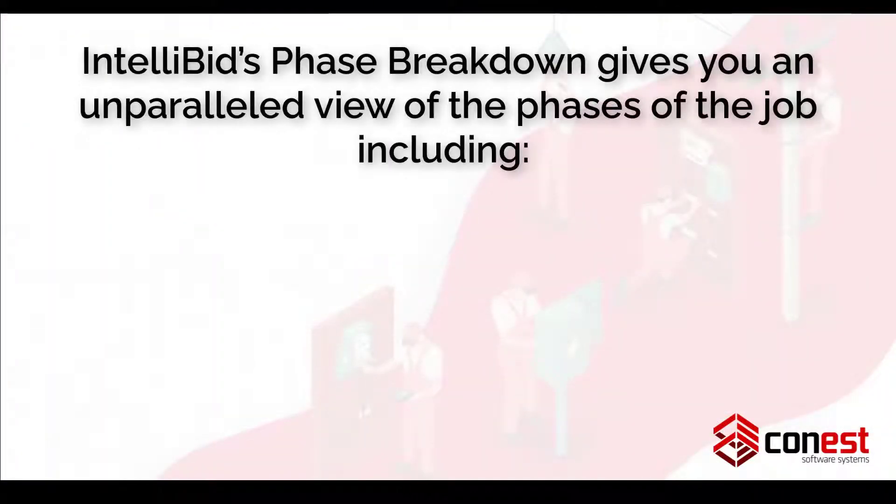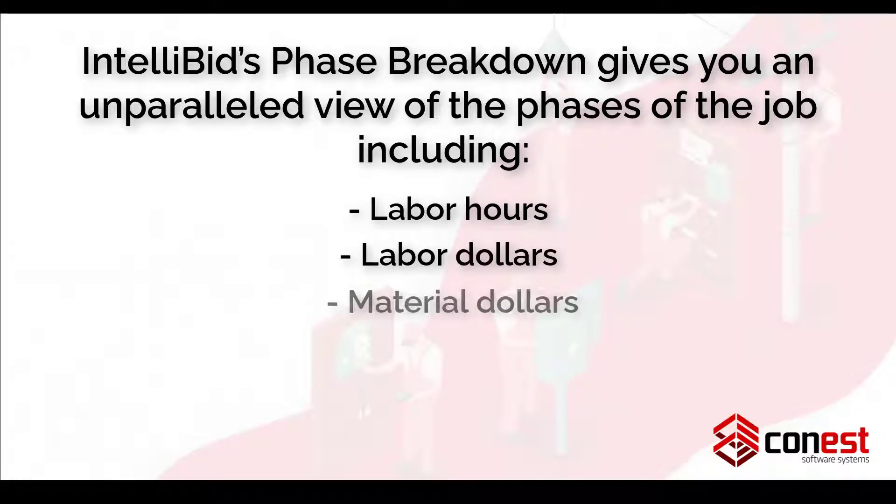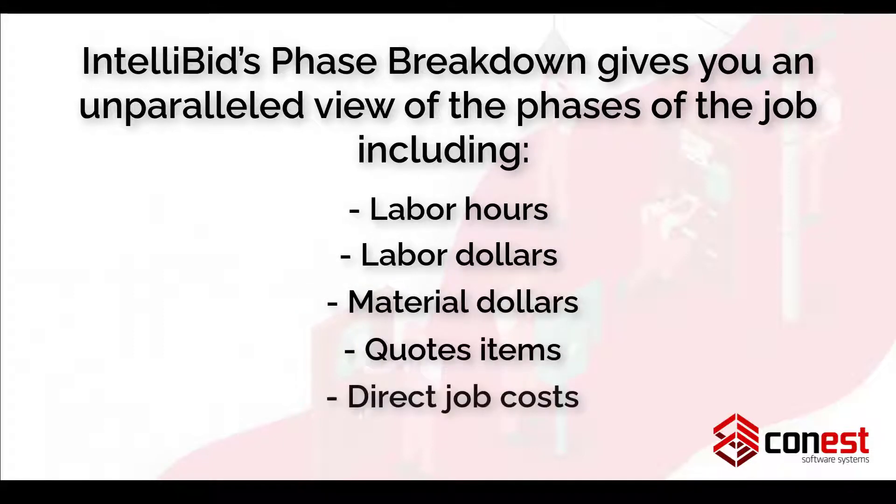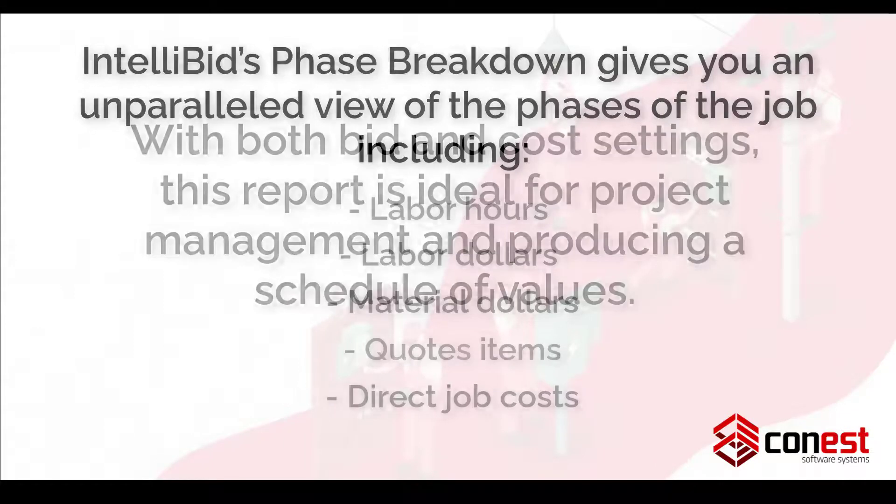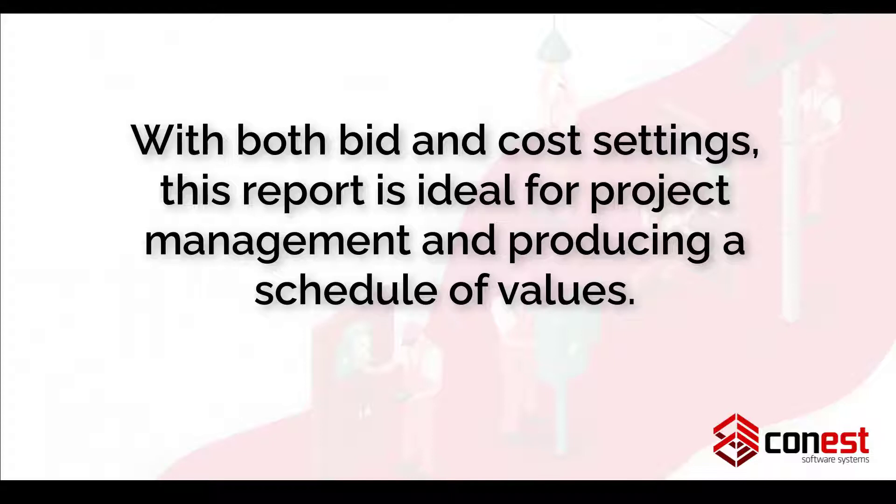IntelliBid's phase breakdown gives you an unparalleled view of the phases of the job, including labor hours, labor dollars, material, quote items, and direct job costs. With both bid and cost settings, this report is ideal for project management and producing a schedule of values.